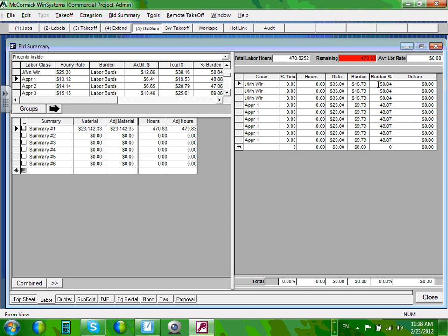Now, if you're using IBW standards, you might have to go there and put that they're going to cost you $64, and the burden is going to go 0 because that $64 is part of the whole package, the deal. Cool. Our apprentice in reality is costing us close to $50 here with the benefits. Our journeyman, and our apprentices are also close. Okay, let's stick with this burden.